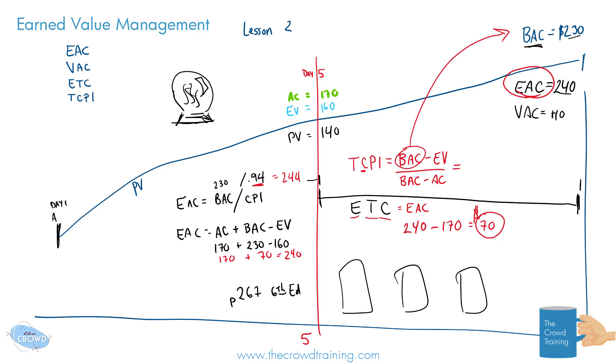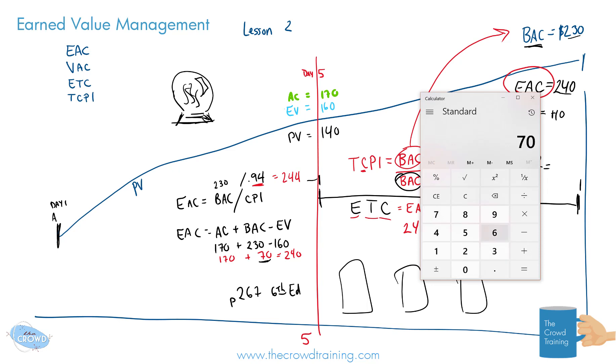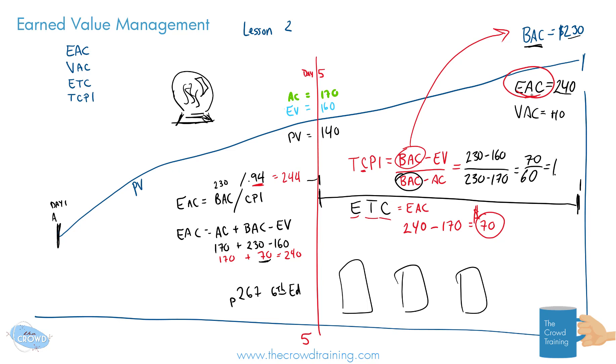Actually, I'll use a black pen so it doesn't mix with our equations. So 230 minus what we've earned up to this point, which is 160. And then, again, we're using the budget at completion, 230, and subtracting the 170. So that gives us the two numbers of 70 like we had here and 60 here. So now, doing the equation, I'll bring up my calculator again. We have 70 divided by 60 equals 1.16. Let's just say 1.166.